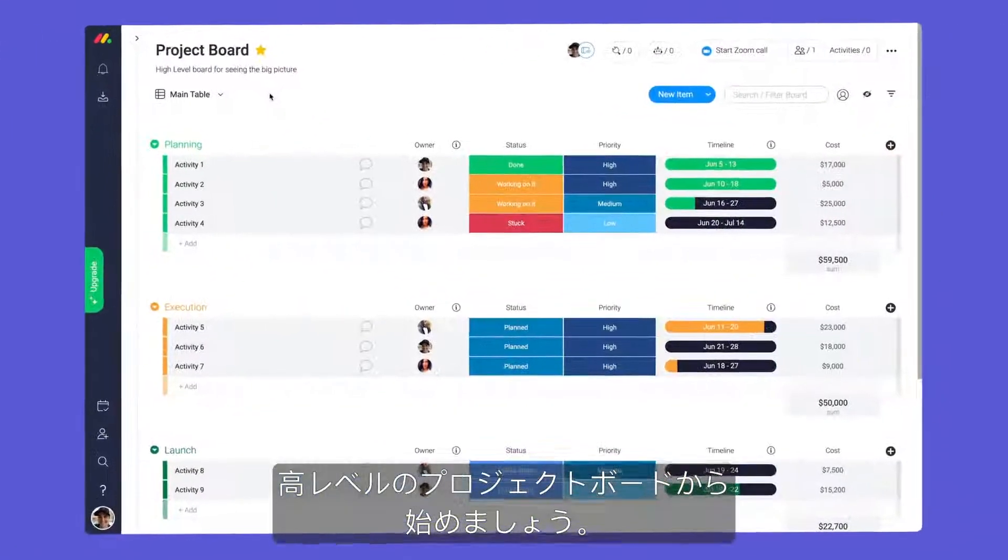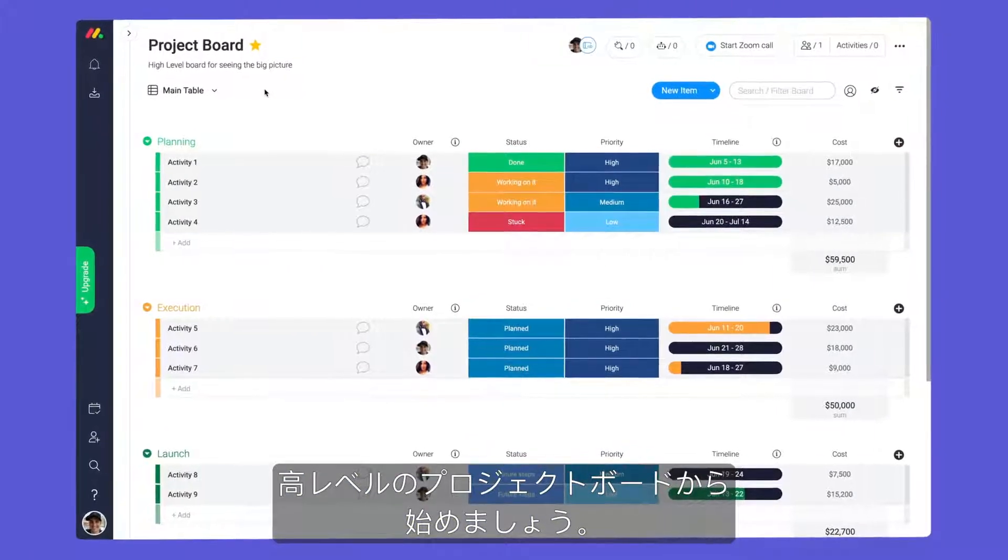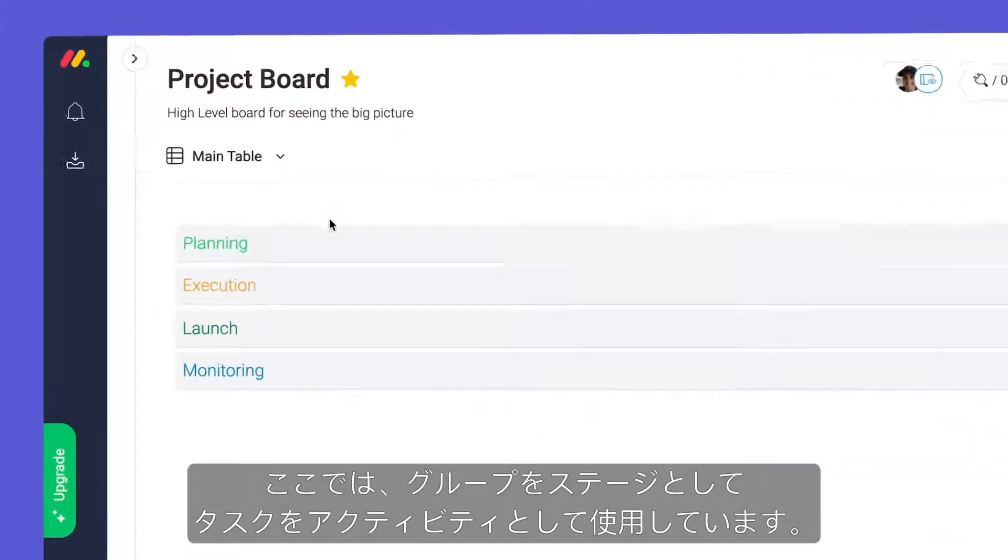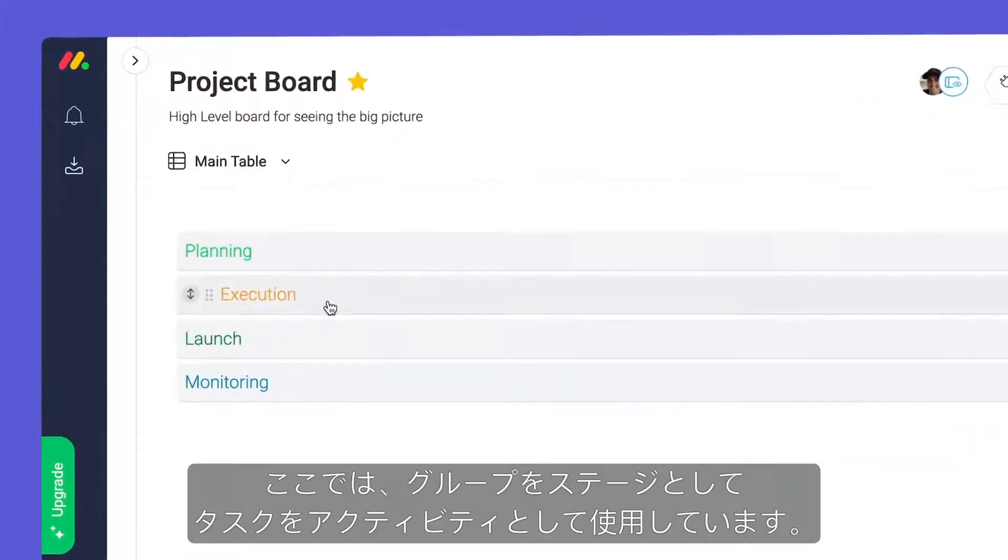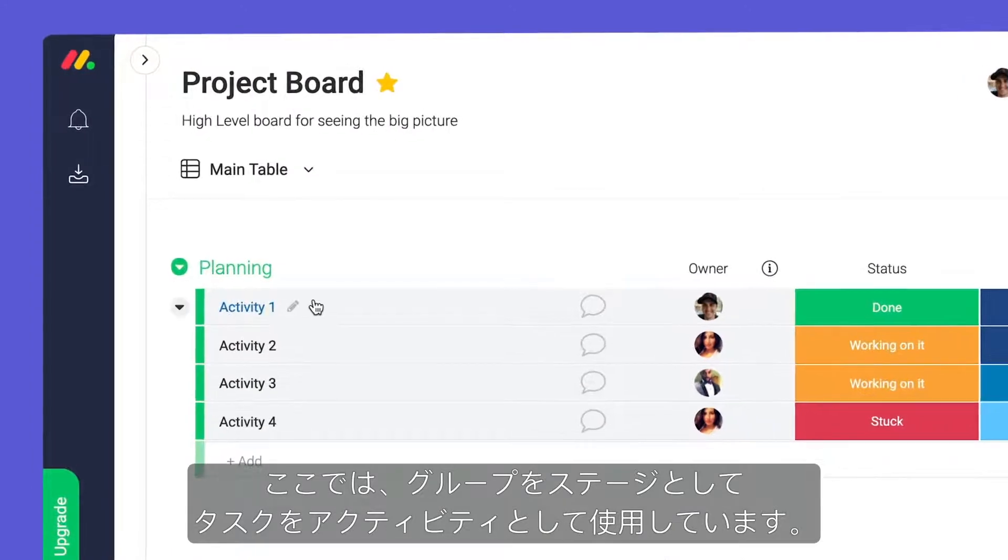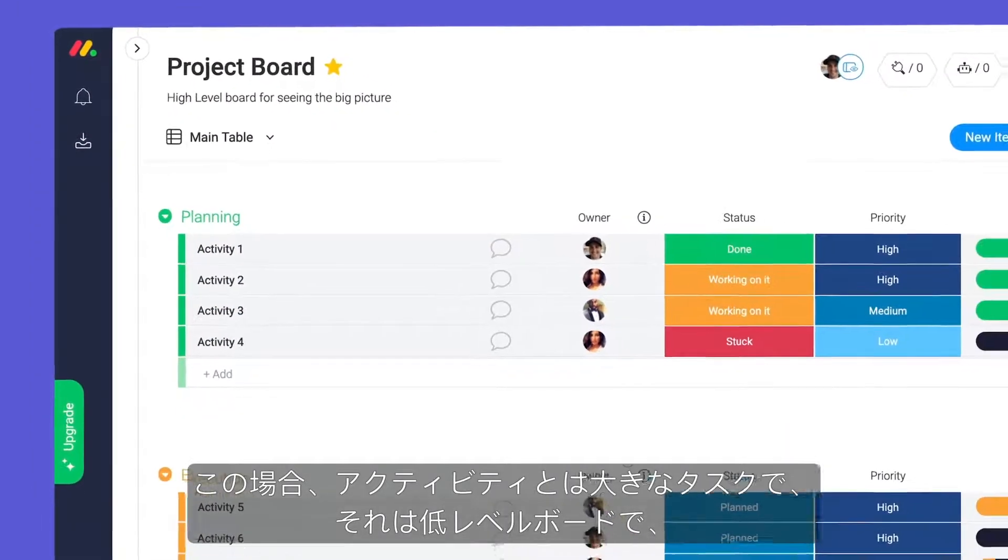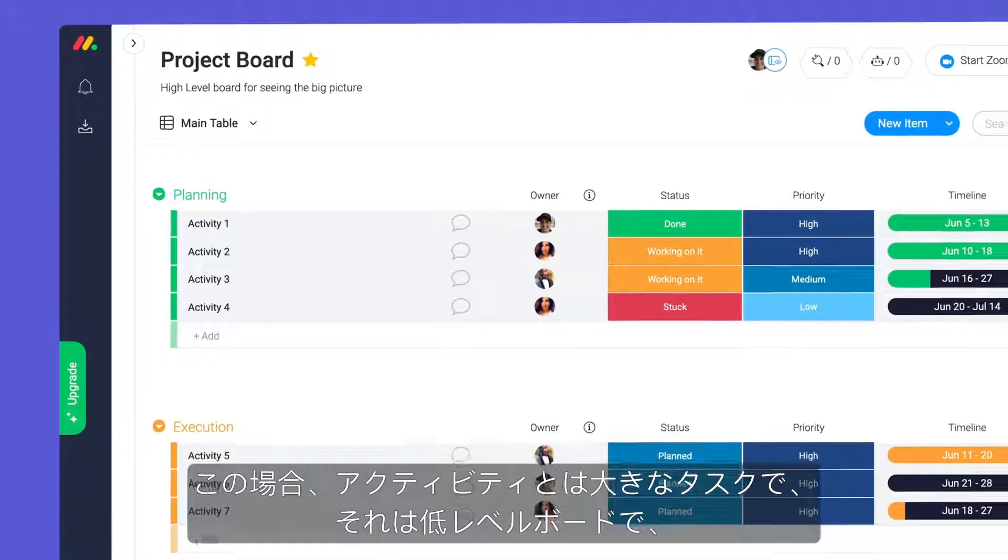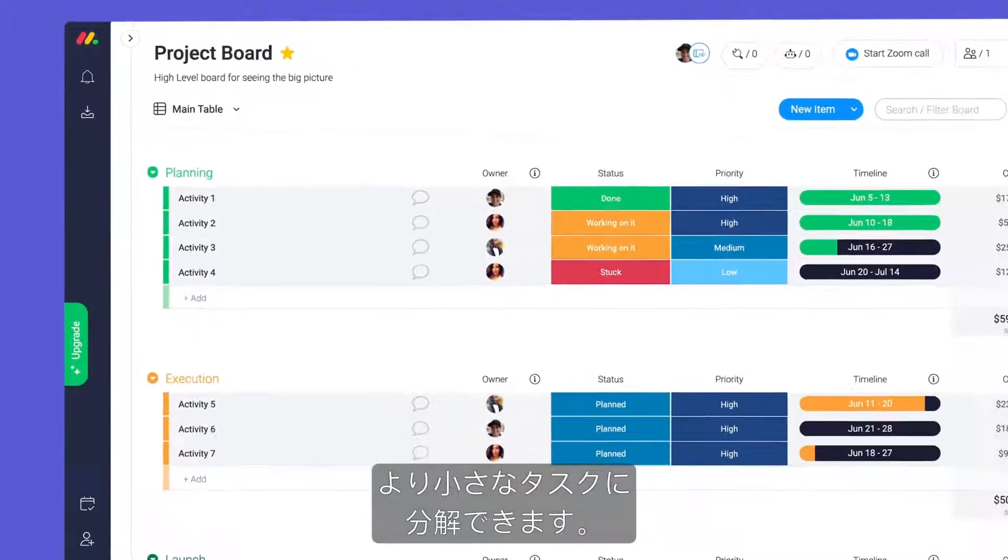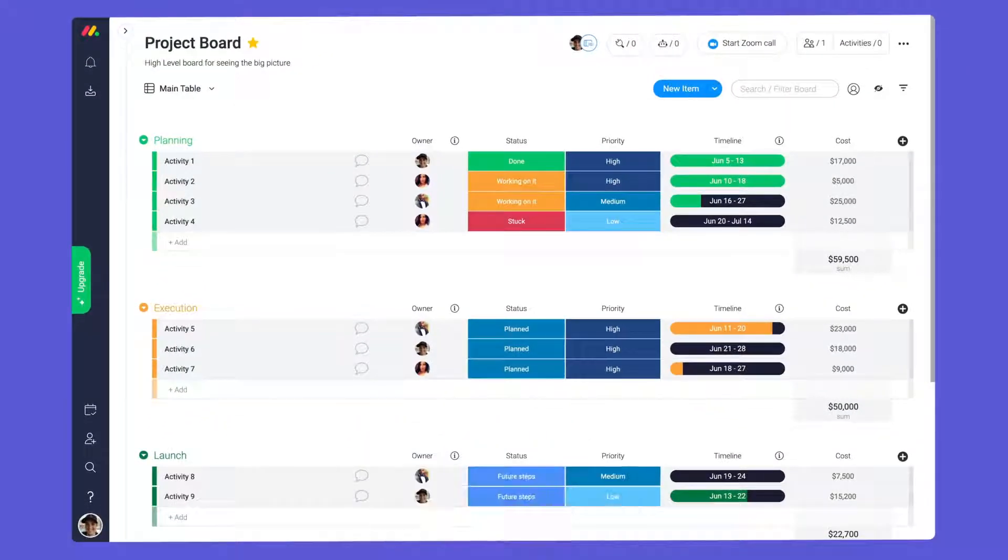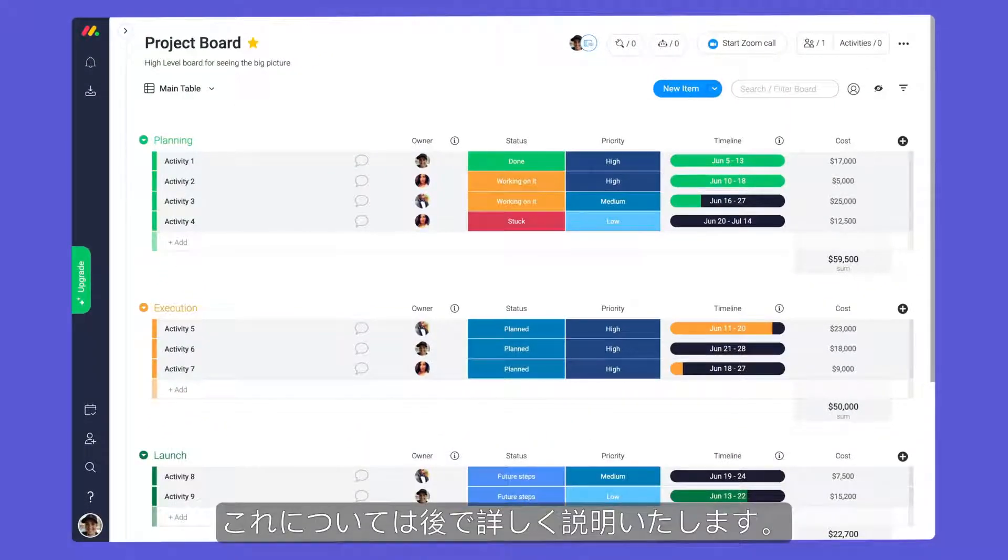Let's start with our high-level project board. Here, we're using our groups as stages and items as activities. In this case, activities are larger tasks that can be broken down into smaller tasks on our low-level board. More on this later.